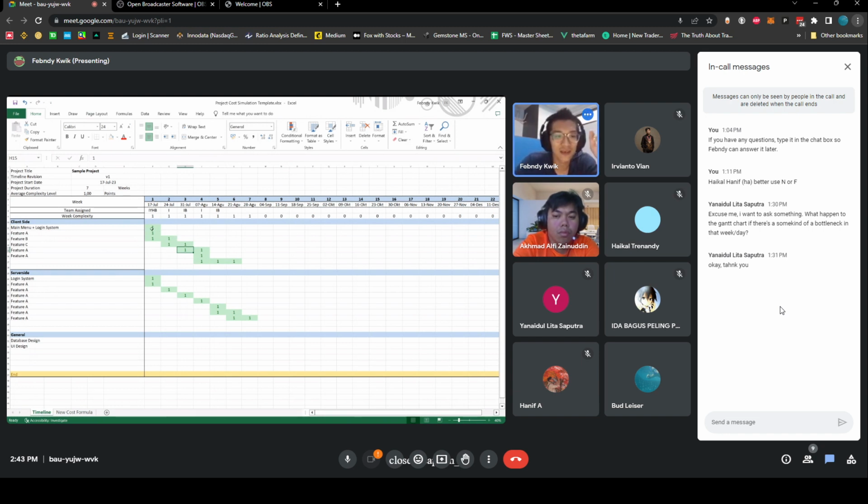Let's say you have this main menu on the client side, which is going to require the server side. We knew that this is going to require the server side and this database design. If you take a look at this, this is going to be a bottleneck in this case. If this is not done, this usually can't begin. Most of the time it could, but sometimes it can't.